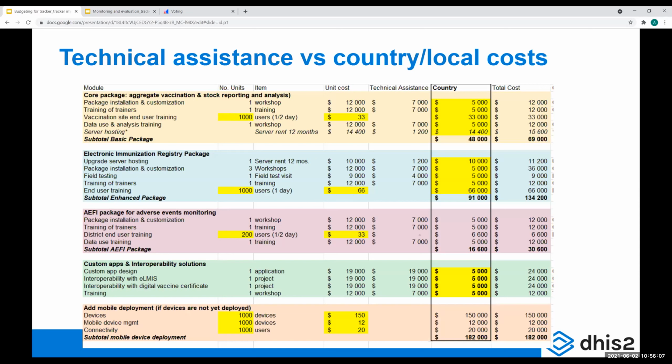Every time we release something or we make changes, these changes should be made in a different server, not in production. So I would keep an instance which can be called staging, training, testing, whatever, for as long as the project is running. At least this is what I've been doing. This is what we did at the NGO I was working for. And I think it's a very good way of working.